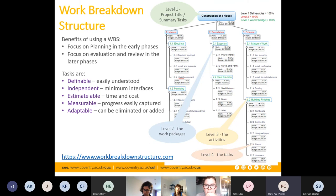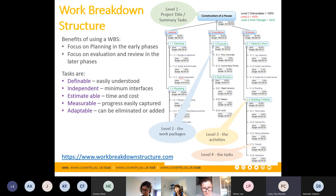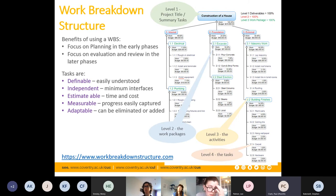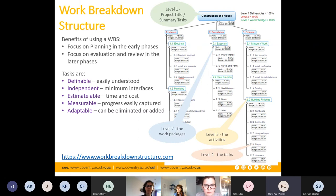The main benefit of a work breakdown structure is tackling daunting tasks by breaking them into components — for example, building an airliner: build the chassis, put the engines in, put the wings on. It breaks a project into more manageable chunks that are easier to understand and control. Work breakdown structures are used on major road improvement projects and Highways England contracts, including when working with suppliers and contractors to break down the work they'll undertake, feeding into the programme.